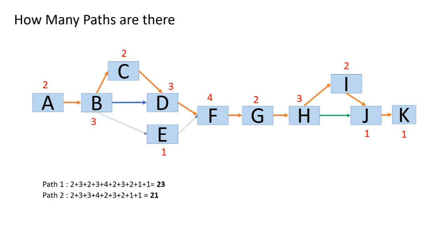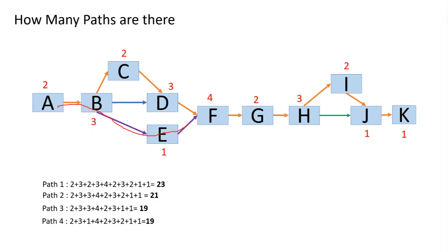You can stop the video and write it on paper and see how the path is located, the way I have shown you, and after that you write down all the durations, and then you will be able to see how many paths there are. So the third path is taking 19 days, which is like this. Now the fourth path, this particular path is there. This is taking 19 days. And the last path, which is the fifth path, is here, this one. So it is taking 17 days.